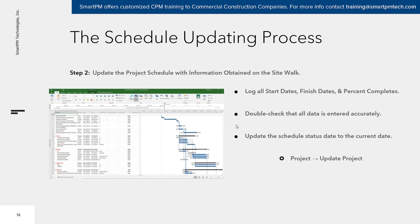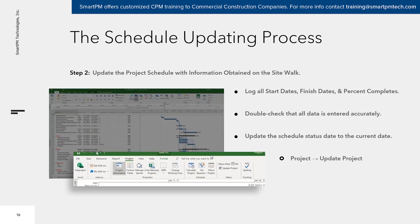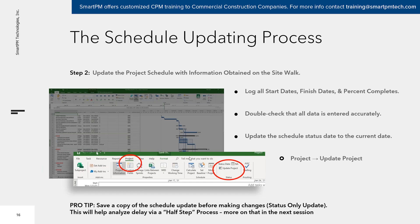One very important step that Microsoft Project users frequently forget: update the status date. Once you log that data, you need a data date as of the point of collection, so the program knows the data is as of a certain day and can recalculate everything — finish dates of all future activities, all float, and potentially the critical path. In Microsoft Project, go to Project, click Status Date, and enter the date. Primavera has a similar function. This brings the line to current and recalculates everything incomplete based on all constraints, relationships, and remaining durations.